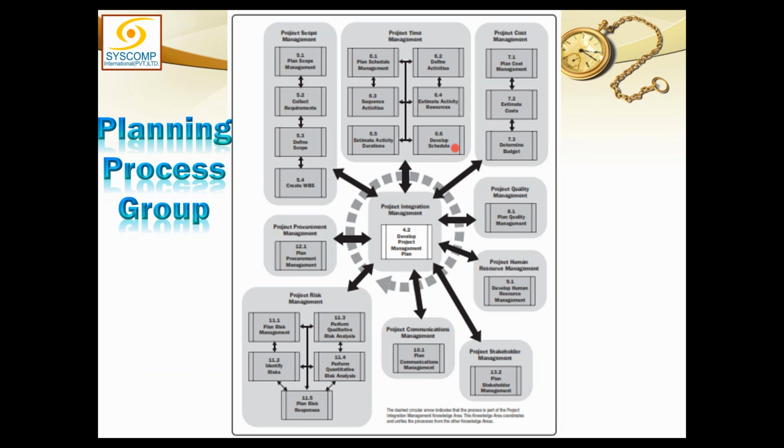Once the project sponsor has baselined the schedule, then nobody can change it without a formal change request procedure and the permission of the project sponsor. So the project manager does not even have any authority in changing what has been baselined. So we have only three baselines: scope baseline, schedule baseline, and cost baseline.